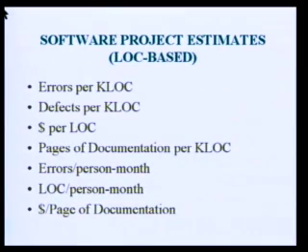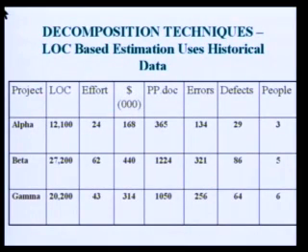The third one is dollars per LOC. Here $168,000 for 12,100 lines of code. So you just have to divide the 168,000 by 12,100. That is going to be the cost per line of code. So for each line of the code you have written, how much it is going to cost you. That is what you are trying to get here. And this you will be calculating for each and every project. Let us see what will be the next item.